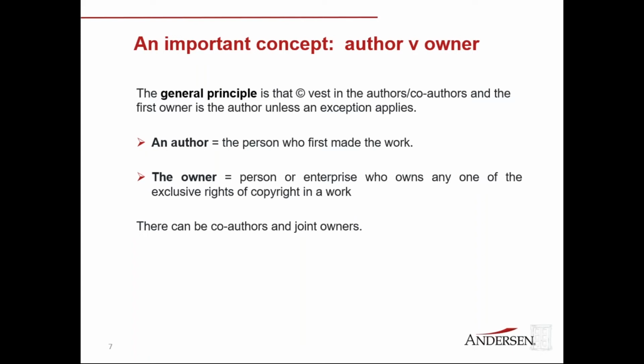You then get engaged by a client to develop a project. The project requires that you use BIM and develop Revit models. So do you sell Autodesk software to the clients? No. They engage you because they want a building. At the end of the day, you sell them a design for a building. But then what happens to the individual contributions that went into that design? Does the client get the benefit of all of this information? Do the architects retain their IP? What about the structural engineers? This all needs to be considered and defined in project scopes, licensing agreements, manufacturing agreements, and made subject to certain limitations and restrictions, such as the period of use and the scope of use, i.e., you may use it, but only for this project.